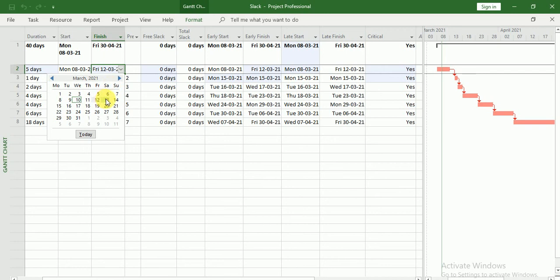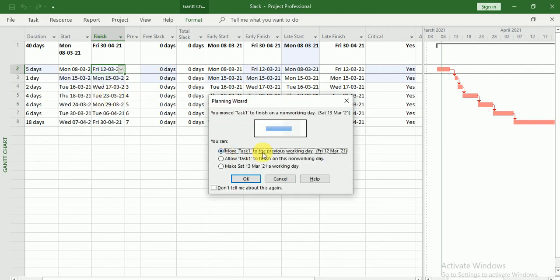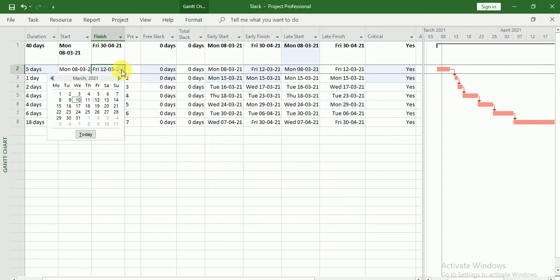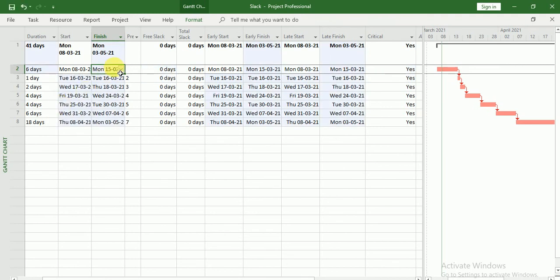Suppose if I set it to 13th — then you can see a prompt to move the task to the previous working day. This is because Saturday and Sunday are off. Let's set it to 15th. Look, my project finish date has been changed automatically.